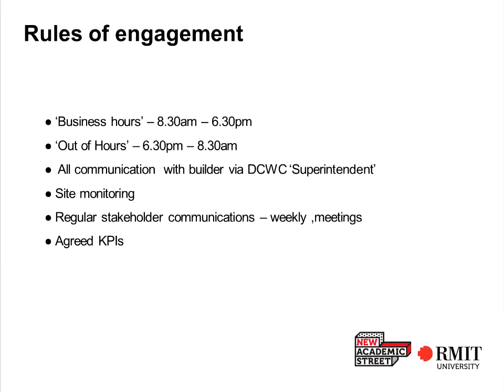So we've got some thresholds, as you saw, around noise and vibration. We've got hours of operation that are called out in the video as well, and what constitutes business hours and normal working hours and out of hours. And then we've also talked about the permissible noise levels, and we've also mentioned through the comms activities about the weekly notification that goes out.